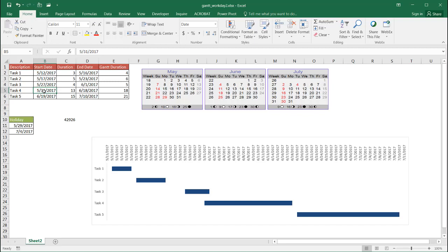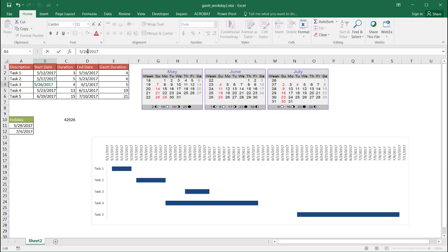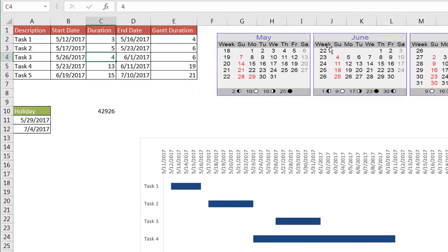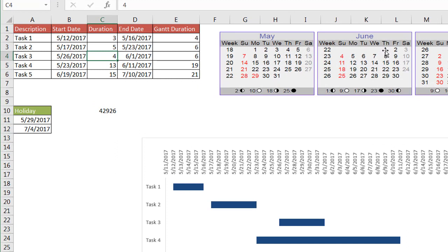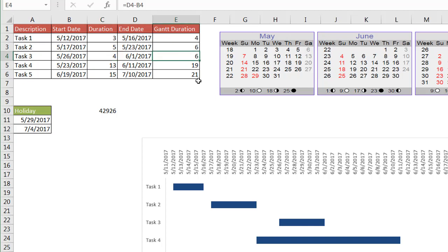And we can also change some other dates here. Maybe this was 5/23/17, press tab. You can see things have changed here. And the dates correspond. Let's make it easier. Let's say 5/27, that was four days. We count 5/27, oh that's a Saturday. Let's make it 5/26. That probably makes it better. We don't want to start on a Saturday. Maybe we want to start on a Friday. Press tab. So now it started on a Friday and it's four days. So it's going to count 5/26, not going to count the holiday 5/30, 5/31, and Thursday 6/1. You can see 6/1 is correct here, but it's also got to count the duration of the difference between the end date and the start date, which is six days. And it's drawn that out kind of nicely here. And since it's counted up to be six days for the Gantt duration for the chart, you can see that it correctly ended it at 6/1 here visually.